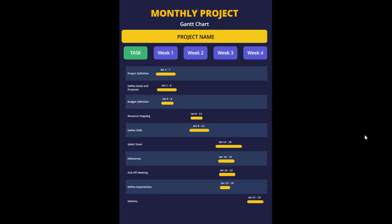In today's tutorial I'm going to show you how to create a Gantt chart for a monthly project. You can add the title, the Gantt chart name, and the project name. I'm going to add tasks on the extreme left and then add the timeline for four weeks, from week one to week four. Task names include project definitions, define business goals and purposes, budget definition, resource mapping, milestones, etc. The timeline runs from January 1–7 to January 23rd–25th.